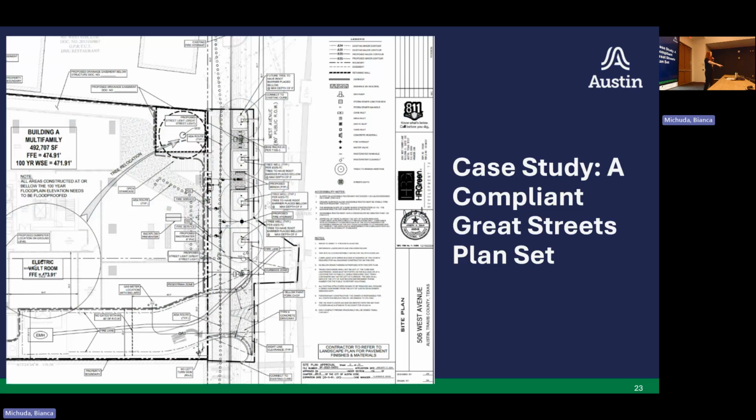Site plan is to get a permit, right? Whereas license agreement is to document what is actually happening as far as vertical improvements in the right of way. It's a legal mechanism to document that, as well as it establishes maintenance. So that's an overview of how those two processes are the same, but working for different reasons.